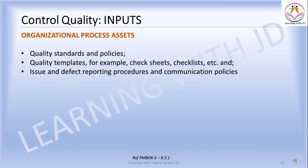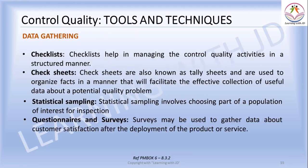Let's see what are the tools and techniques for controlling your quality. Data gathering — we have seen this before. We know checklists and check sheets, and statistical sampling. For example, if there is an order to create an entire building and you just created a wall, you check the wall to see if the quality of the cement throughout the building is fine. That is statistical sampling.